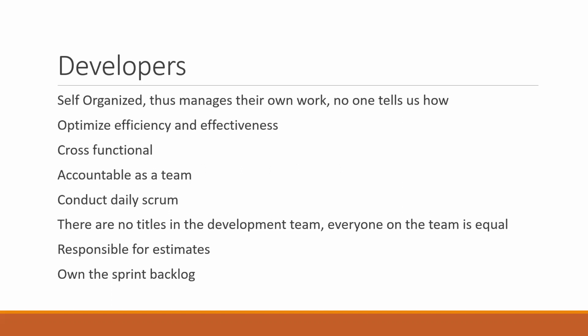For example, if you have 7 developers on your team and all of them are present all 10 days of a 2-week sprint, then if you take out a 20% or 30% buffer time and the focus factors, the hours they spend in meetings and so on, each developer will end up with maybe 4 or 5 hours of development time in a day.